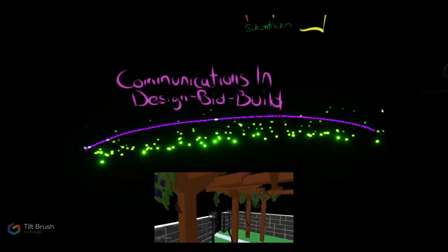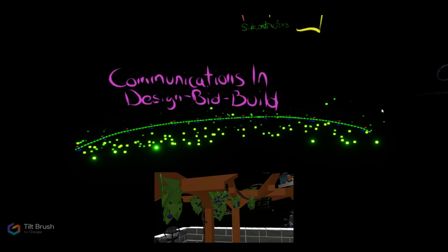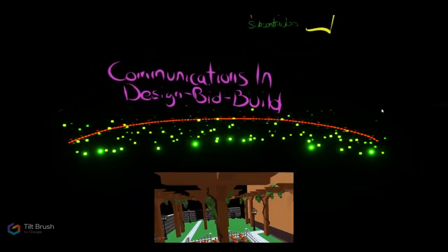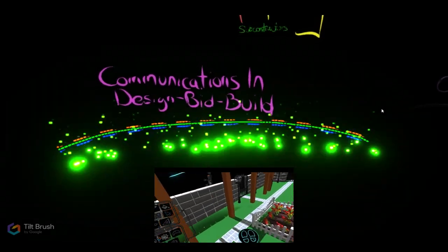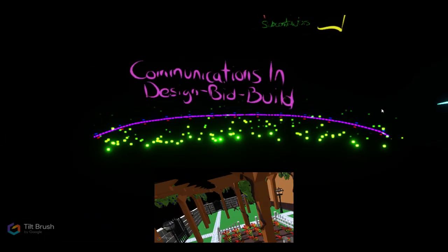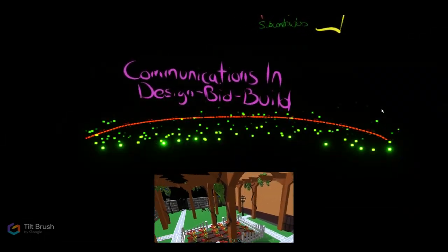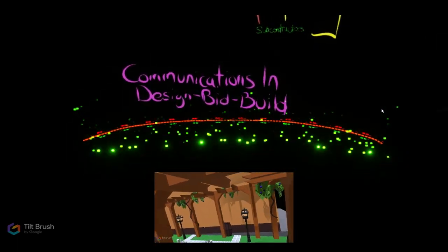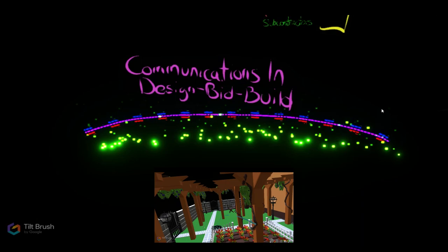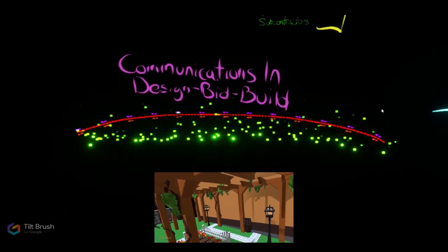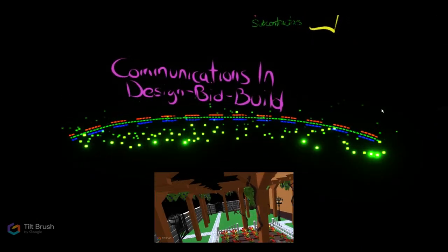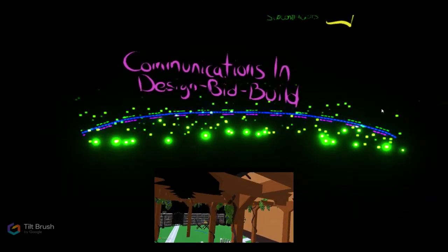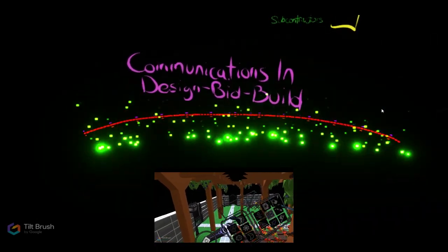During the construction phase, special care must be taken to avoid communications that transcend the contractual lines of privity. Subcontractors should not communicate directly with the architect but should approach the contractor's superintendent or project manager. Most problems on the job site have a larger impact than just the particular subcontractor's work, and the superintendent or project manager has the responsibility and perspective to discern the full impact of the change or concern.